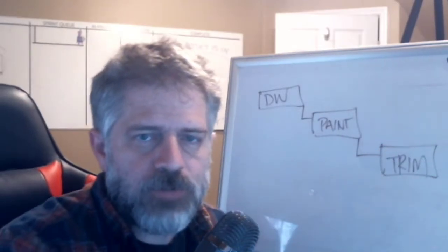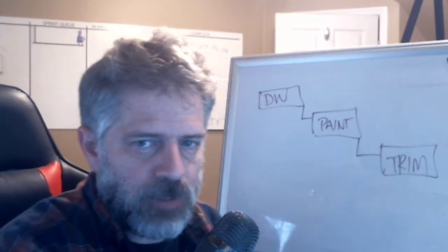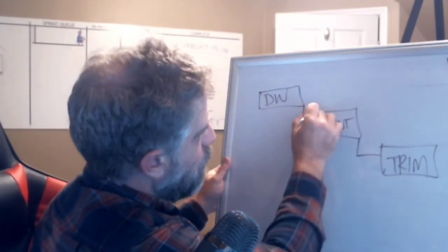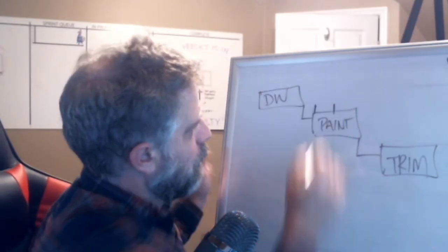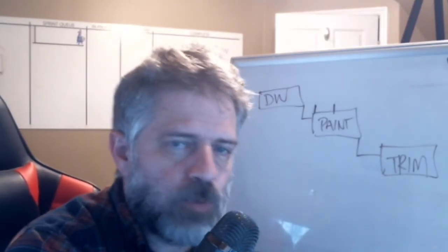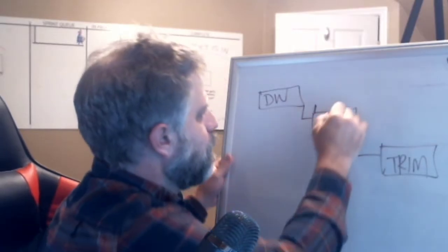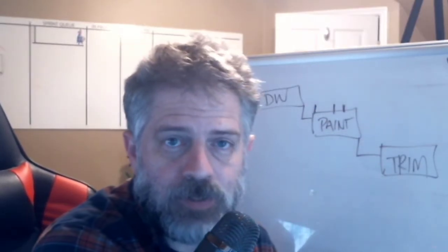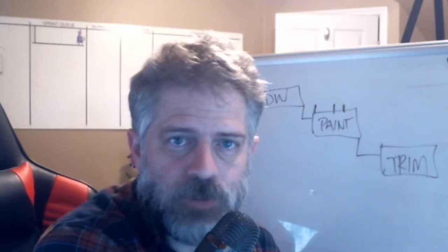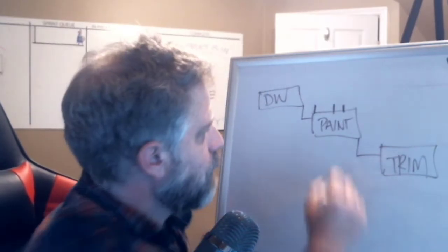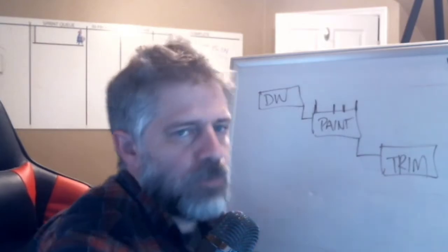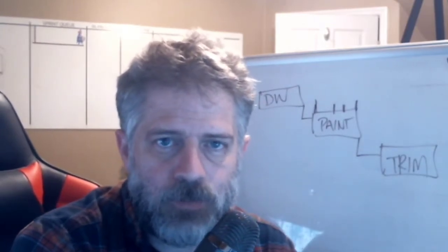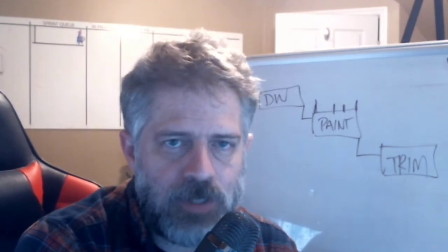So once the drywall's done, it'll be time for paint. And he's told me, here's what's gone on. He knows he can get the job done in 4 days, but he adds a couple of days. And that's what he tells me. And then I know he's typically late and often runs over by a day or two, so I add a couple of days. And so what I stick in my Gantt chart is 8 days for painting, which is 200% what's actually necessary.